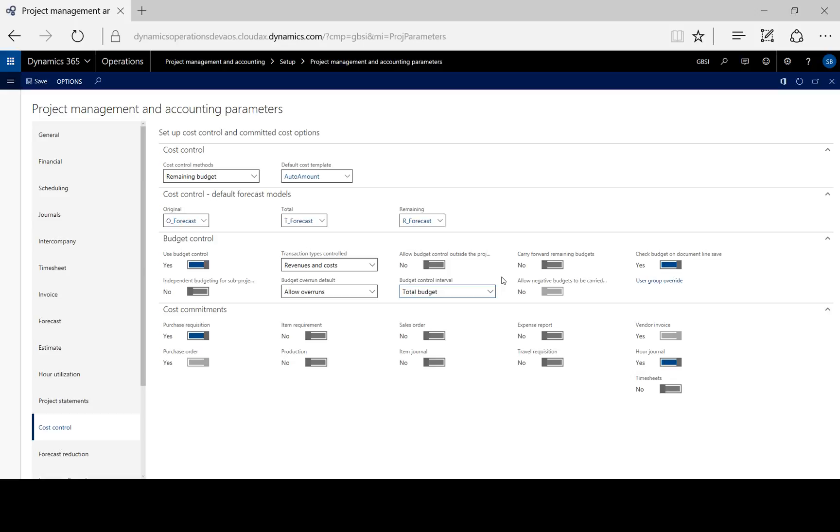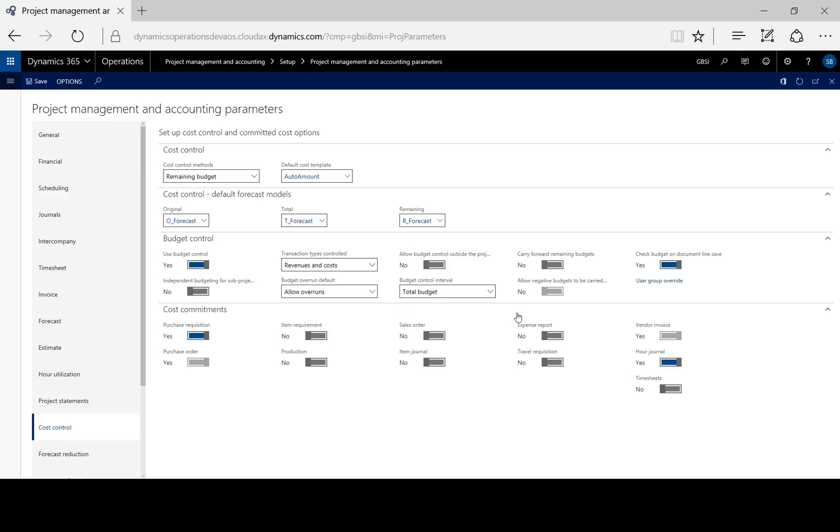Now the default setting allows budget overruns. And we can define overrun options for specific user groups or projects in the project budget settings for user groups form, which is accessible here.